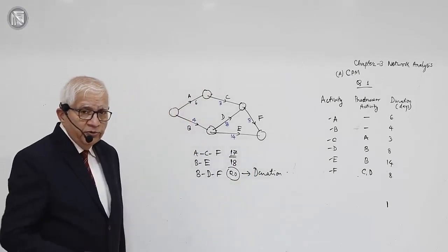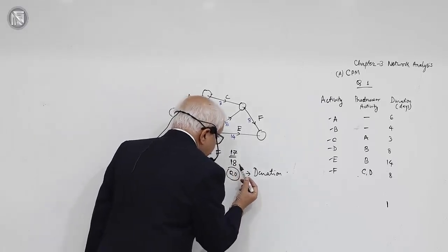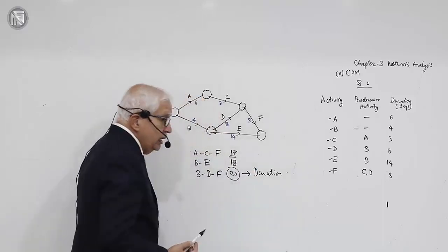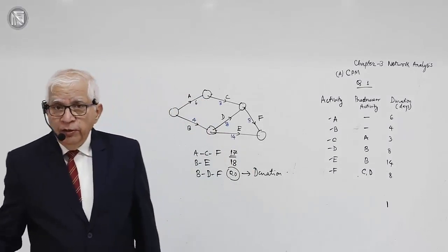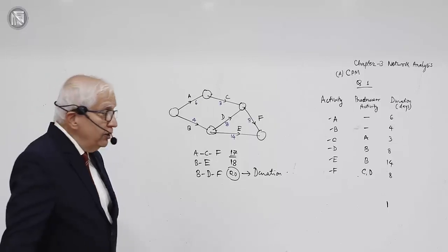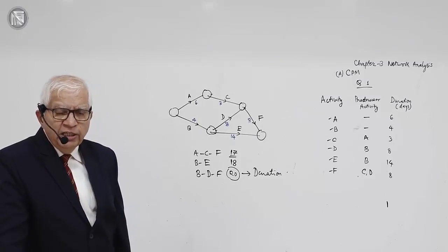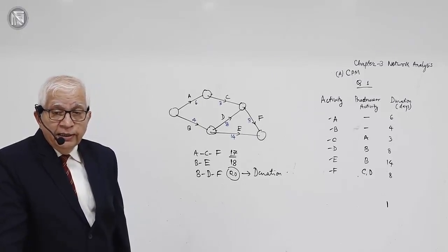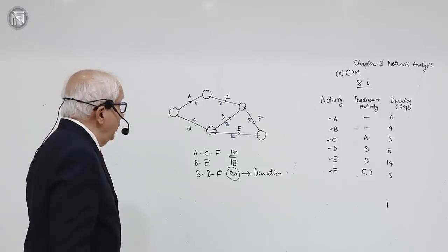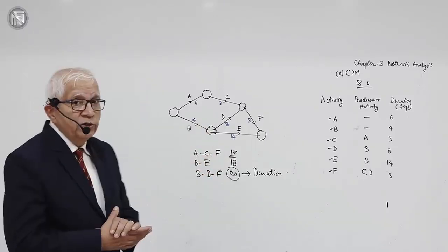Okay, this is our teams, team J and team L. And here this path is taking 18 days. That means there is some spare time of 2 days. Here there is a spare time of 3 days. Means in one of the paths there is a flexibility of 3 days totally. And in one of the other paths there is a flexibility of 2 days totally. As a result, these paths are not critical. The critical path is the longest path, and the longest path over here is taking 20 days, and therefore the duration of this project is 20 days. That is what we have found out.